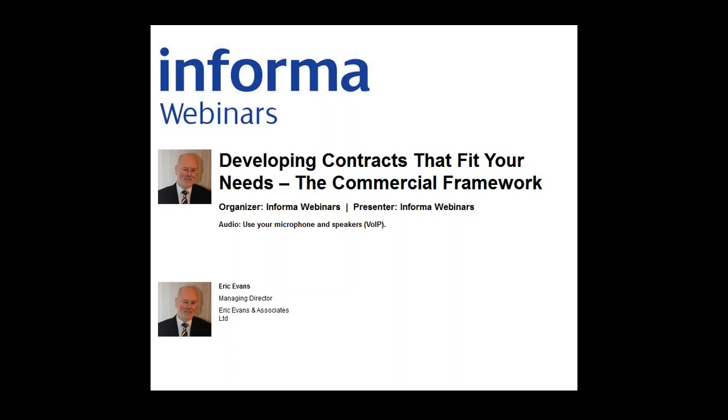The reality is, I have to tell you, there's also a difference between a price which is a fixed price and a price which is a firm price. Again, within a contract, people will typically define fixed and will typically define firm, but the reality is a fixed price can change, but a firm price cannot.